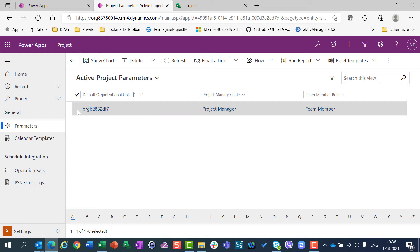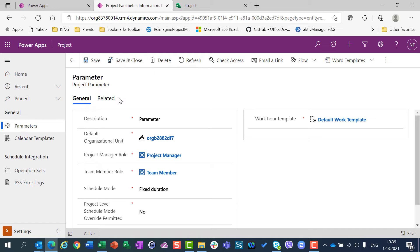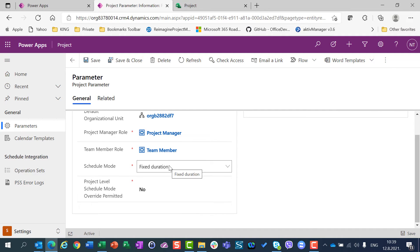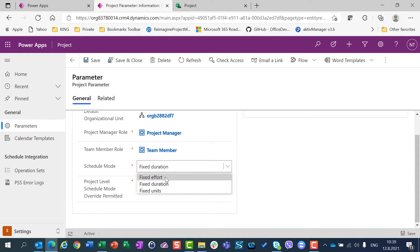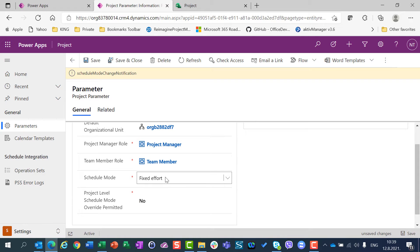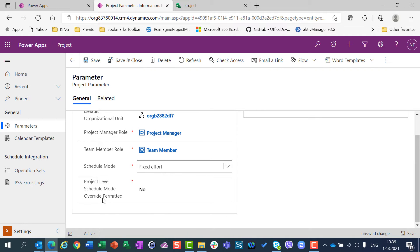I have only one organization unit, so I will select it, click Edit, and here I can see that I can change the scheduling mode. The default scheduling mode is Fixed Duration, as I have mentioned many times in my previous videos. Let's say I prefer Fixed Effort, so I'm going to change my organization unit's scheduling mode from Fixed Duration to Fixed Effort. Now I have an option called 'Project Level Scheduling Mode Override Permitted'.